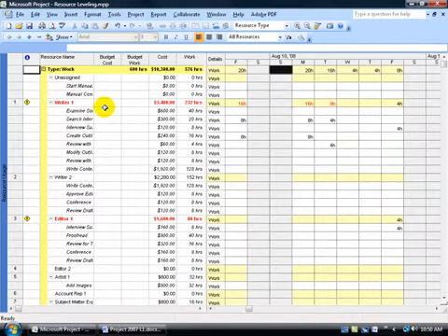And then again, it's up to us if we want to go ahead and unassign Writer 1 from one of these tasks and reassign somebody else, delay the task ourselves, or push it out so it's not starting at the same time. Or as I mentioned in the previous training video, you can contour your resources here by changing the individual work hours. So instead of 8 hours here, put 0 hours and put 8 hours over here. So we're basically saying don't put all your hours up front, but backload it on this task while Writer 1 is working on another task.